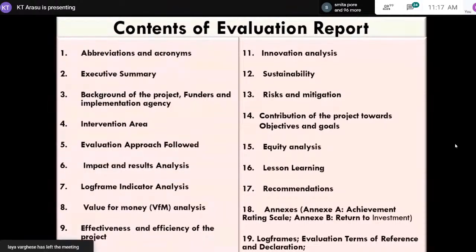As I told you, with the evaluation indicators, you have to zero in your decision on certain things. For that, indicators will be helpful to focus, because your project is a larger entity, so we have to delimit to some focus area. For the objectives, normally the standard is, for example, for the goal, 3 to 4, even 2 is quite okay. Similarly, for the objectives, 3 to 4, and for the outputs, maximum 5. These are the general numbers for the outcome indicators.